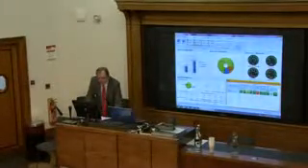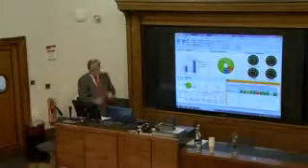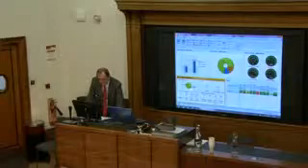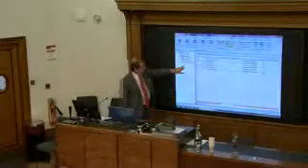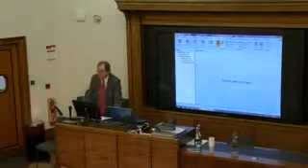And on the left-hand side, in this box, I've got a logic quality panel. And I can see that I have a few problems. So if I click Open Ends, this will take me into the logic area of the tool. And what this is doing, it's looking at the open ends, and it's come up with 2, 4, 6 activities that haven't got any predecessors or any successors. I can go and look at lags. How many lags have I got on my project? No lags. Have I got any logic on summaries?